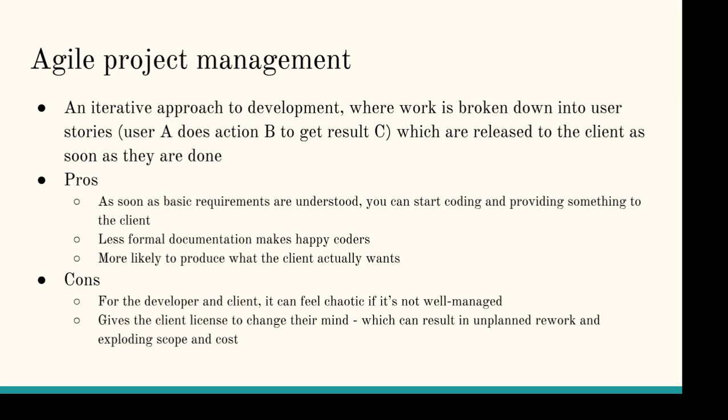And those are people who are testing, who are product managers, who are developers. They get together, and sometimes the client too, every day and say, this is what I worked on yesterday, this is what I'm working on today, and this is where I'm stuck, if I'm stuck anywhere. Every person shares that really quickly so that the whole team always knows who's working on what. And you can see that if you didn't do that, it would be really easy for stuff to slip.